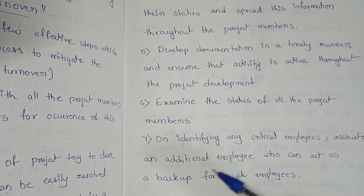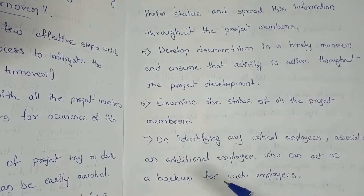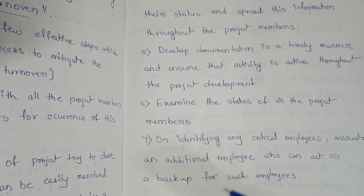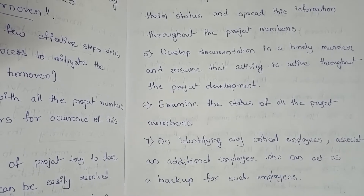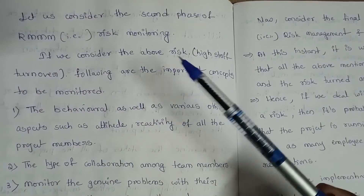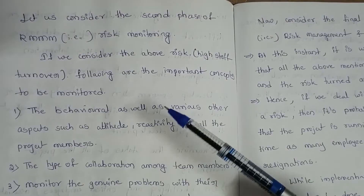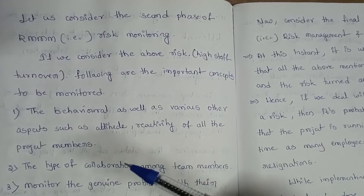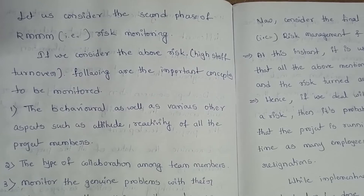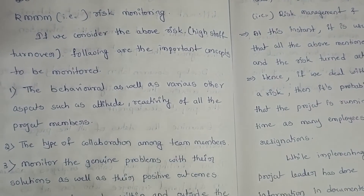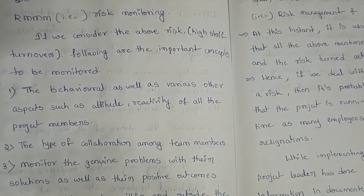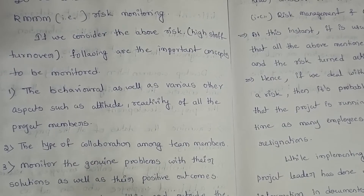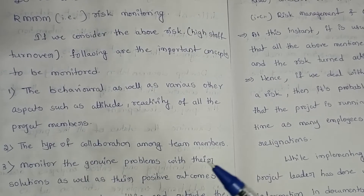For the risk of high staff turnover, in risk mitigation we can simply say we have to maintain a proper document of the employees who are dealing with the particular project. Coming to risk monitoring for this risk, the following are the important concepts to be monitored: behavioral as well as various other aspects such as attitude and reactivity of all the project members, and the type of collaboration among the team members.